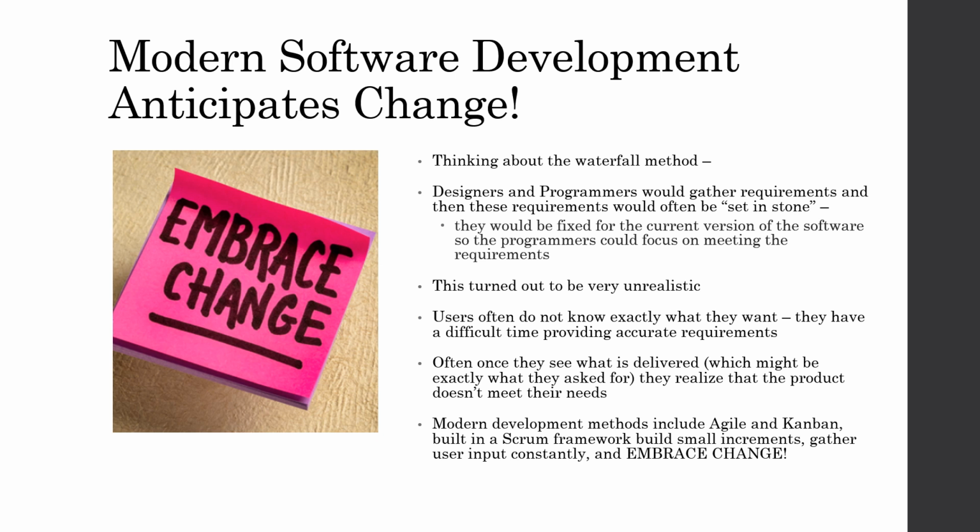What we've done then is realize that, hey, we don't get perfect input, and if we would break our process up into smaller steps and had our users involved with this all along, yes, we will still do a major requirements analysis at the beginning, but out of that will come a lot of tiny tasks, and we will work those tiny tasks one at a time with user input. And we will what? Embrace change. We will know that the requirements are going to change.